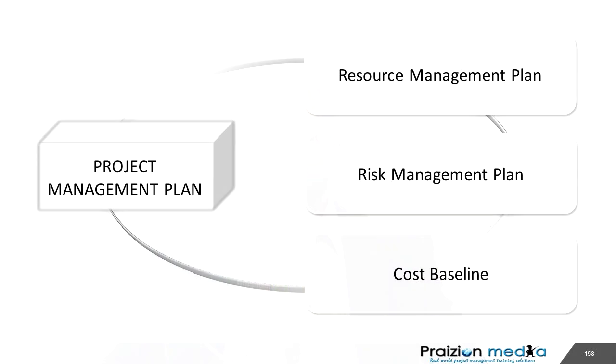The project management plan, of course, contains the risk management plan, I hope you remember. In addition to that, we also have the resource management plan and the cost baseline here. The cost baseline contains information about the contingency funding for those risks, the contingency reserves.